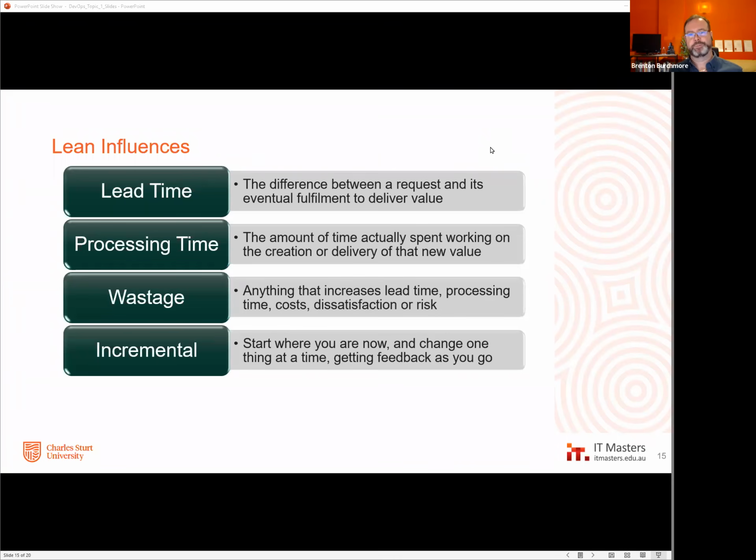Now, if you're going to have a bunch of people from different disciplines get together, look at a feature on Monday morning and try to get that live by the next day, then they're only going to be able to work on a small amount of things on that day, right? It's not going to work if they've got a to-do list of 50 more things that they have the pressure and the responsibility of juggling and prioritizing, saying, oh, let's do these things today. And the testers are saying, well, we want to do these things today. And ops is looking at something else. They're all on different value stream activities at different times. This is about lining them up with a small incremental thing that everyone can look at, one thing at a time.